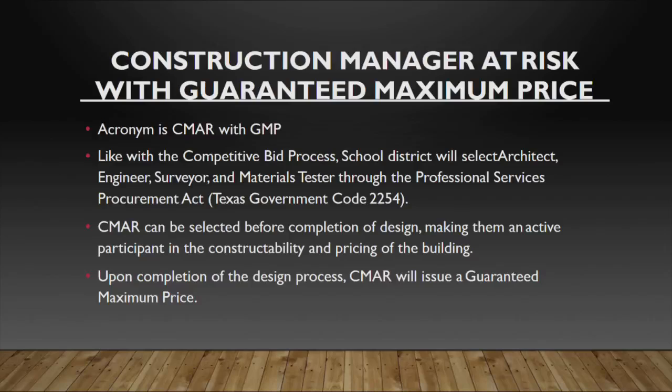So with this process, the school board would select an architect, an engineer, and several other professionals through the Professional Services Procurement Act. And as soon as that contract is entered into, then we would initiate the process for selection of a construction manager at risk, which would be working alongside the design team and the project manager to go through the first couple of stages. And that's got a lot of advantages, and maybe we can go over those.